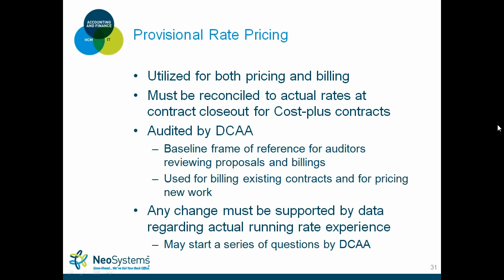So in some of these slides that we've been talking about, we're talking about provisional rate or forecasted rates, okay? Provisional rates are essentially towards the end of the year. You take all of your costs from either the same year or a previous year, and you combine the two, and you say, okay, I ended up the year at fringe at 30%. Well, I'm going after 3 RFPs that's going to increase my employee FTE count by 20 employees.